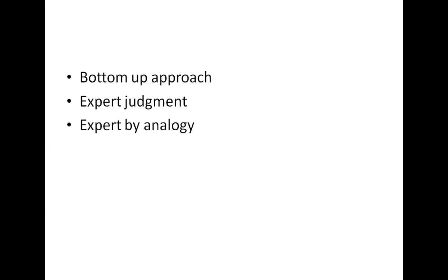So the bottom-up approach describes the following. First, it envisages the number and the type of software modules in the final system. Also, here we estimate the work content, taking into account complexity and technical difficulty. These are the approaches in bottom-up. And last, calculate the work-days effort.